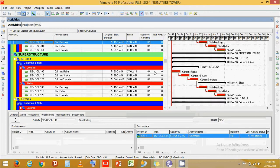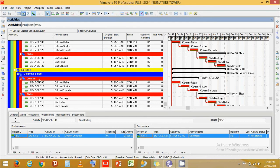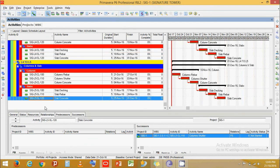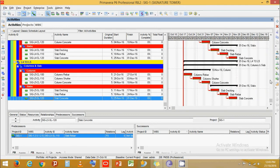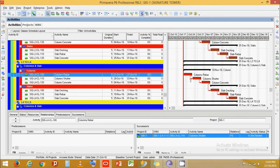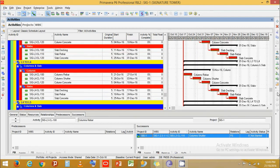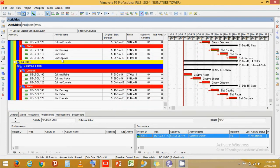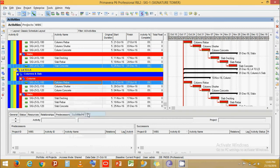Come back to the activities level. We can see all activities up to Level 5 have been created. However, there's a problem — some activities don't have successors. Click on the activity, press Ctrl, select the next activity, right-click, and select Link Activities. A link has been created.